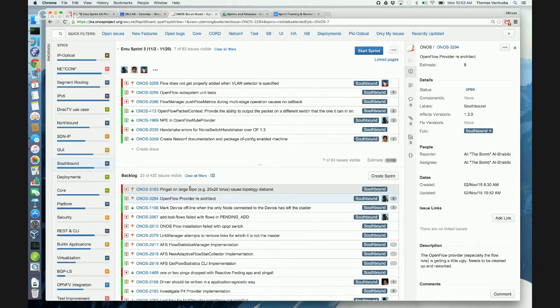I mean, it's okay to overshoot the sprint. It's not the end of the world. No, I don't think so. I think we agree that we want to get better at this, right? All right, fair enough. I rest my case. Yeah, overshooting 20% is okay, but not by much. All right, let's take it out, and we'll pull it back in at some point.